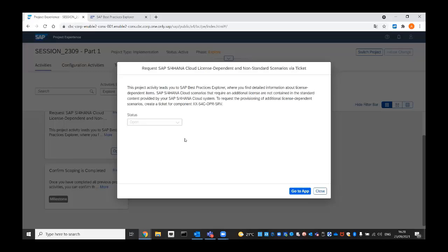You want to manage it. Sorry, you want to manage it. And then you see you can't change the milestone. So it's not in process, and you also can't complete it. You can simply see, as a project member, that something is to be touched, but you can't really control it or move it to the next step. This is only possible now with the role, with the authorization from the project lead.